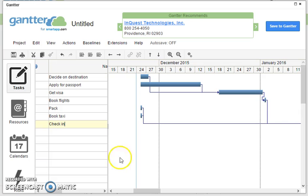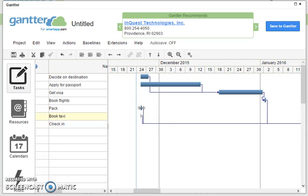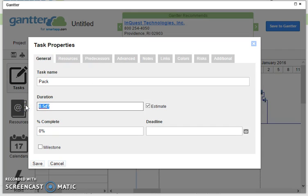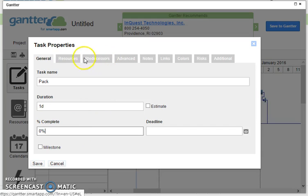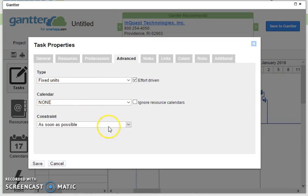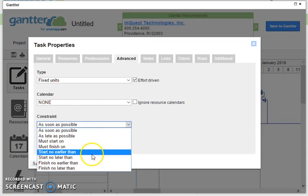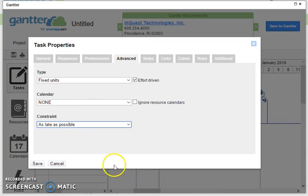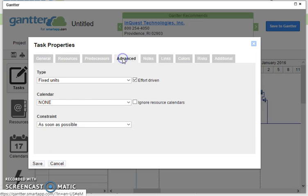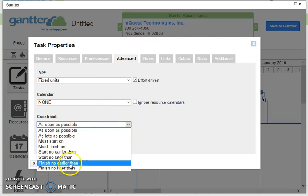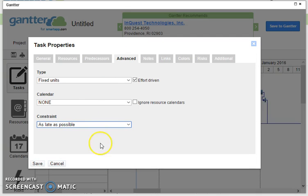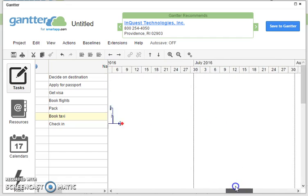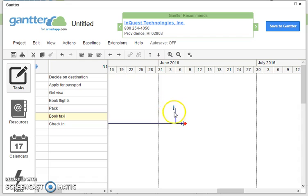Now booking the taxi I can do that quite late, so actually what I can do is I can change this and say, well packing my bag is going to take one day, there we are, and I'm going to go to advance and say it should be start as late as possible, there we are, and then booking my taxi again is going to start as late as possible. So now we can see we've got our full chart where all of these things are scheduled to happen as early as possible, and then right over here I pack, book the taxi, go to the airport and check-in.